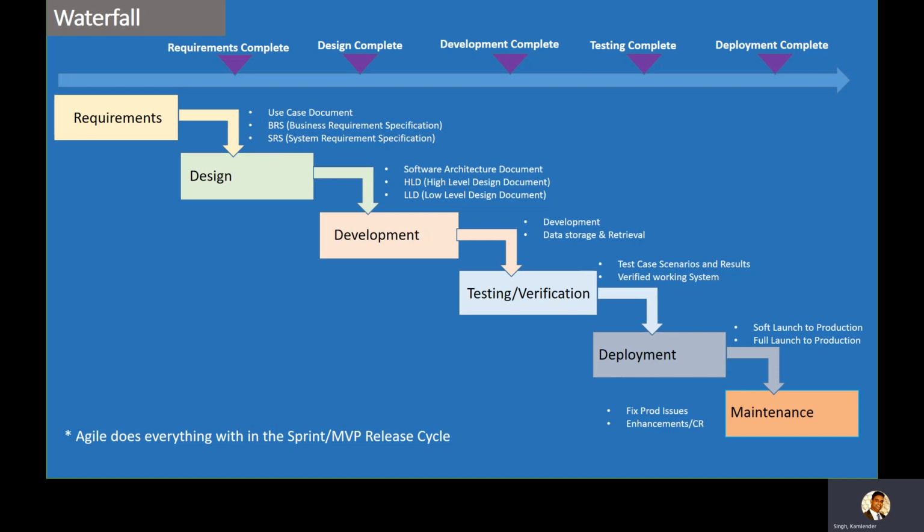So that's basically waterfall. The summary is: requirement phase, and the milestone is requirement complete. The dependency is that until the requirement phase is completed, design cannot be started. So once the requirement complete milestone is achieved, design is started. We know all the outputs from each phase, and we see how they are tied together and adding value together.